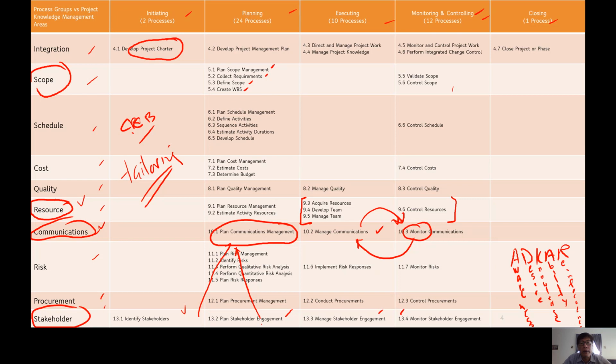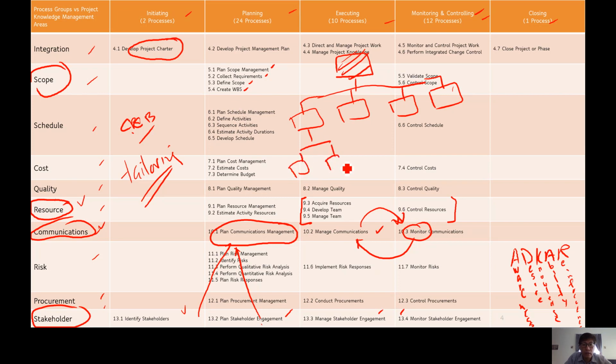And we create a work breakdown structure, called WBS. It's actually a visual representation. So you may have a project, and you break down the big project into smaller constituent units for easier management and what I call delegation later on. So there are subsets or subtasks, sub-work, some people call it. We are breaking it down into smaller pieces of work that do not overwhelm one particular person or team.